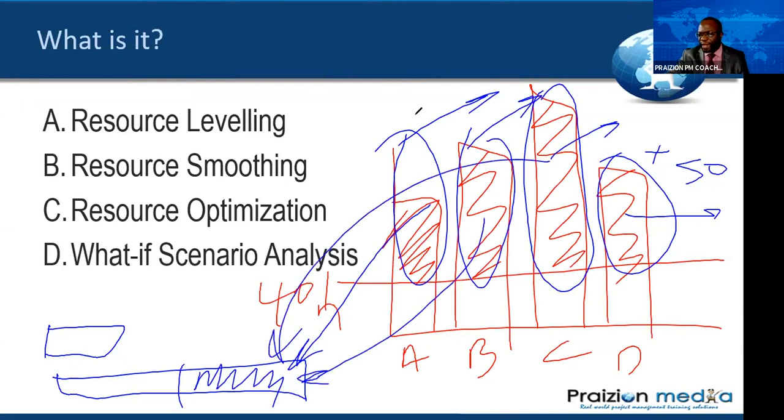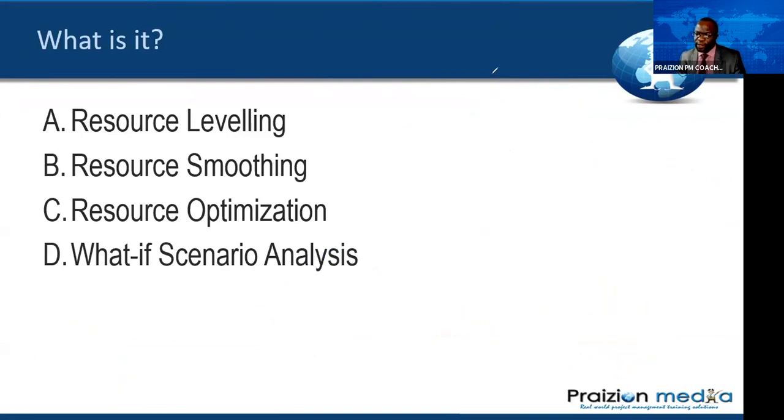The smoothing that you do will still be within these limits. You see, smoothing will not push it out, but leveling, like I said, it consumes everything and more, and it pushes it out, okay? So you probably want to read that a little bit more, get familiar with the differences and the pinpoint precise definitions.